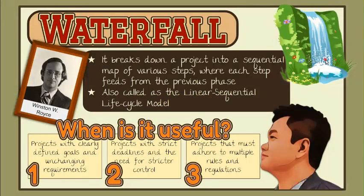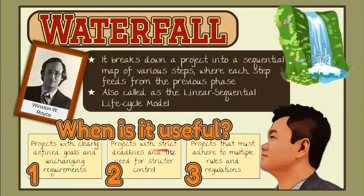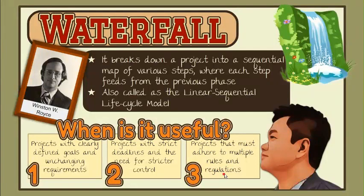This model is appropriate for projects with clearly defined goals and unchanging requirements, like small school website development, projects with strict deadlines and the need for stricter control, predictable budget, and timelines, such as governmental projects. Projects that must adhere to multiple rules and regulations, provided that enough resources are available — for example, healthcare projects.